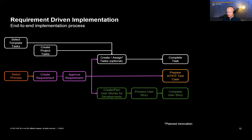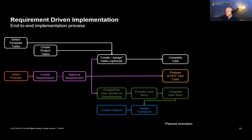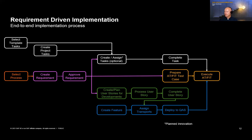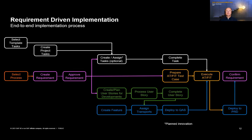After tasks are completed, we handle deployment: what has been built in a user story is captured in a transport that is assigned to the feature. For testing, you deploy the code or customizing into the QAS system to be able to execute acceptance tests or functional integration tests. If testing is successful, you deploy the code to production and confirm the requirement as completed.